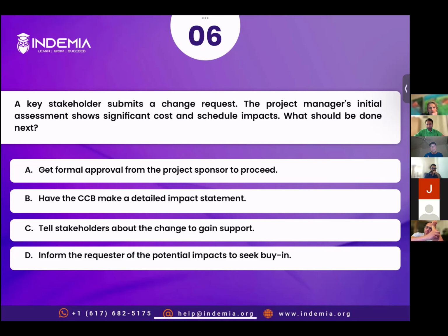All right, Jean, you have chosen option B. Yes, I think what should be done next is just to forward those concerns and the cost and schedule impacts of the change to this team, that would make a whole detailed impact statement or assessment. And then from there, the entity or the person who submitted the request and the sponsors should be informed about the whole impact that will be coming from the change and all this assessment that would be done.